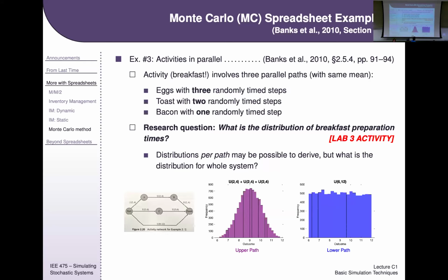That's right. That's what I'm getting at here. So here, it's very unlucky for you to have a 3-step process and take the maximum amount for all 3 steps. But if you only have 1 step that's uniform, then there's a lot more mass over here. It's much more likely it's going to take 12.